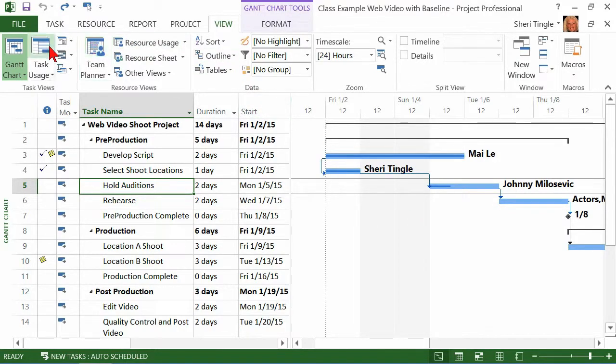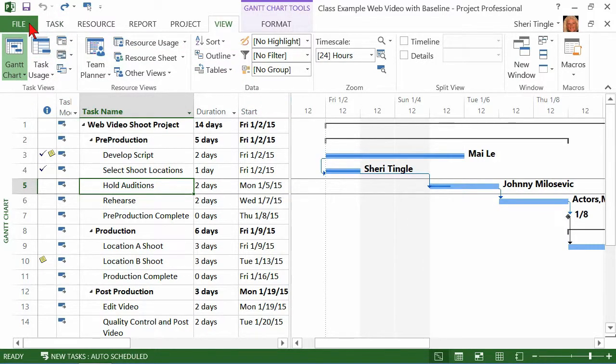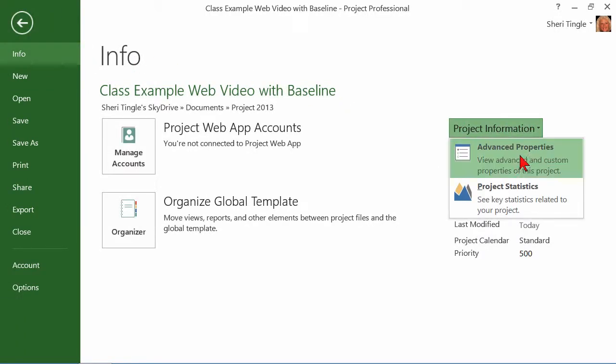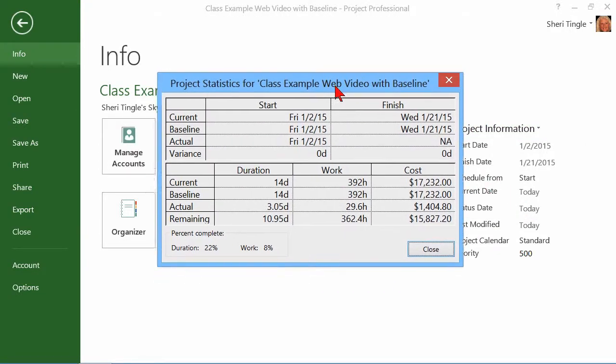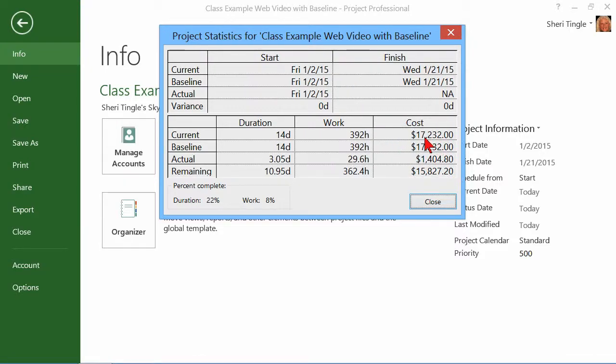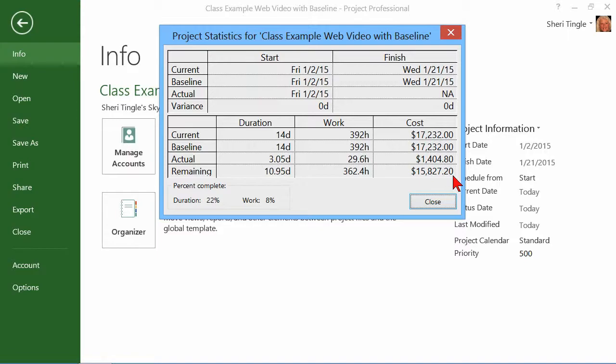Two places that I can find this next option. One of them is if I go to File and in the Info tab, Project Information, Project Statistics, this is the dialog box that gives me all kinds of great information. So it lets me know about my cost totals in the last column here. Currently, it's that much. My baseline, ooh, I'm on target. Those two match. That means I'm on target and I've already spent $1,404.80. I still have $15,827.20 to go.